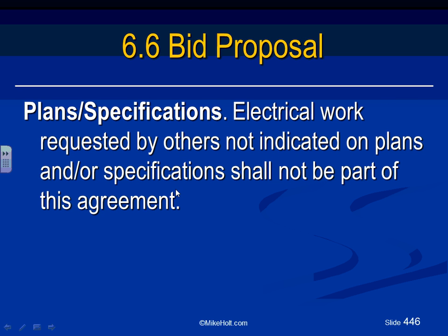Here's a couple of things that you have to pay attention to, guys. When you have plans and specifications, your proposal should say the proposal is based on plans and specifications. So anything that's not indicated on the plans or the specifications must be a change order by agreement, and not part of this agreement. Unless anything is on the plans and specifications, easy. Included. Any changes from plans and specifications have to be a change order.